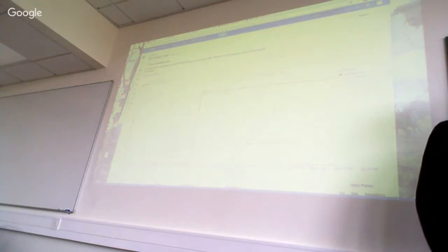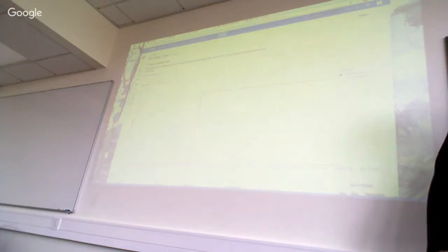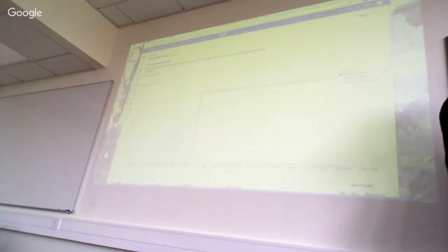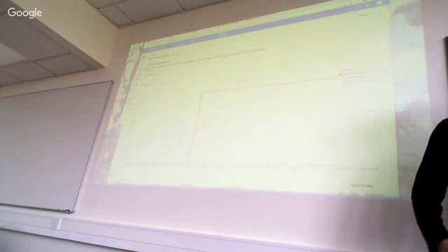So that explains the flat and rise, but why is there no drop? Because we didn't have estimations, because we couldn't add them for some reason. More likely, are you using story points? Story points. So if you never close any issues, they won't be registered. Unless you close them, there won't be any drop in the burndown chart. But the closed issues we had didn't have estimations either. Yes, so it won't show up at all. That's right. So the ones that are not closed yet.